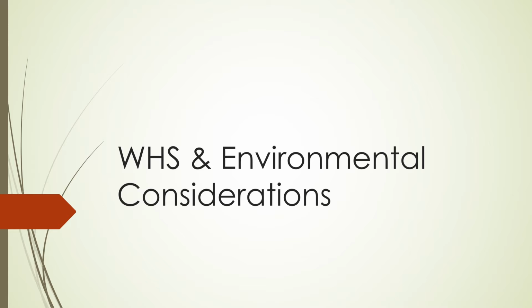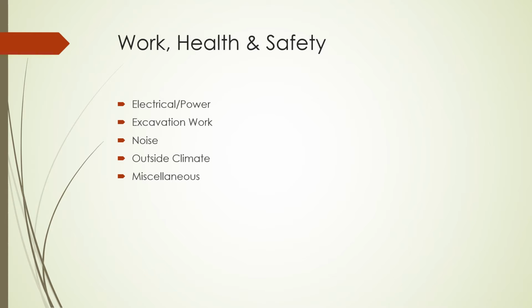WH&S and environmental considerations. Within project construction phases, potential issues can arise that can be of harm to the project infrastructure and all the workers that are on site. As stated by the New South Wales Government Safe Work Plan of 2020, potential issues in respect to work, health and safety and how they can be treated are electrical and power, whereby this risk has caused 2,000 electrical shocks over the past 4 years in New South Wales workplaces, resulting in 5 deaths.